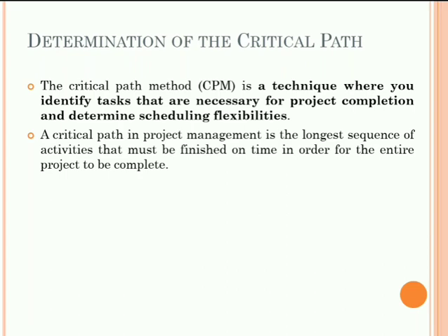It is the longest series of different tasks within the project, and if any of these tasks are delayed, it will push out your project end date. Tasks that aren't on the critical path can be delayed without impacting your overall schedule. Many scheduling tools will automatically identify your critical path for you, as long as you build the key elements into your schedule: all project tasks with start and end dates, task duration, task relationships, and or the different dependencies.